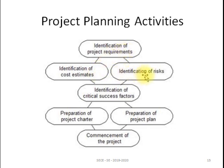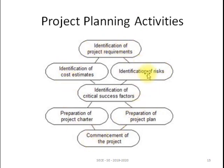Based on the requirements we estimate cost and estimate risk, from which we identify the critical success factor — whether our project will have success or not. After identifying this, we prepare the project charter, which is the timeline of the project completion: the starting date, ending date, and delivery date of the project. Each task has a separate starting and ending date. We then prepare the final project plan and commence the project. These are all the activities performed in project planning.